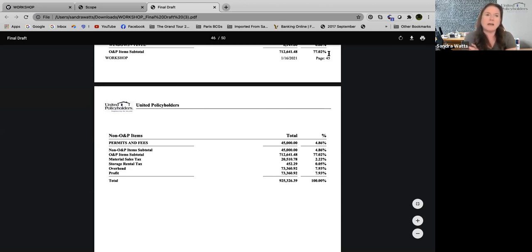So if you guys are in California, there is something called the California Fair Claims Settlement Practices Regulations. And if you can Google it, the Department of Insurance has the whole regulations there. If you go to 2695.9 and scroll down, it says that if the insurance company gives you an estimate, or if they hire somebody to write you an estimate, it's the same thing, and the policyholder turns in an estimate that's higher, there are 3 options, okay? The first option is to pay the difference between the insurance company estimate and the customer estimate.